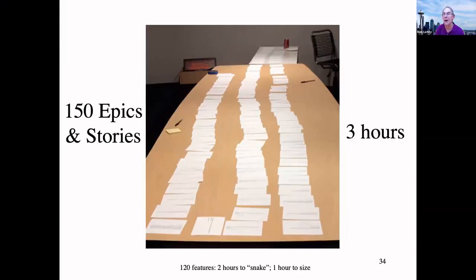And it's merely an exercise of starting with a deck of cards, and the first person puts a card on the table, they've got the easiest job, and hands the deck to the next person. And the next person reads the story and says, I think this was going to take less time or more time. And they look around to their teammates to see, do we have agreement around that? General agreement, not consensus, but consent. Can I put it down here, which says less?